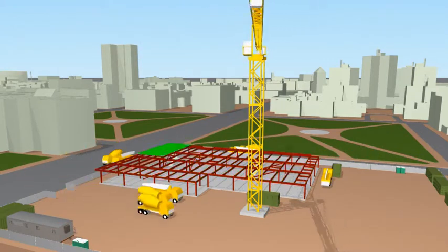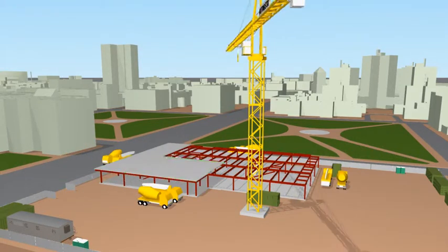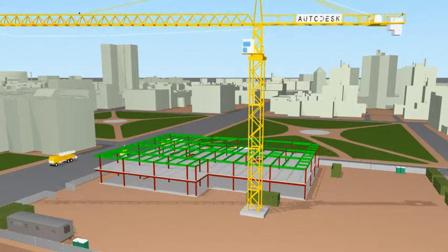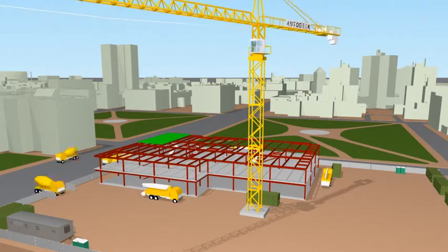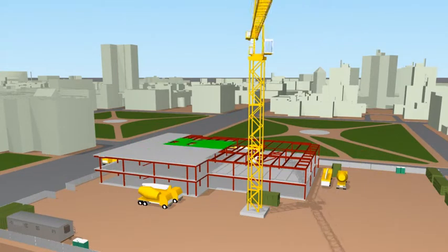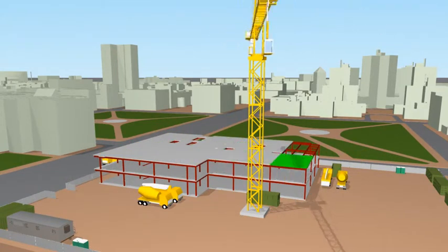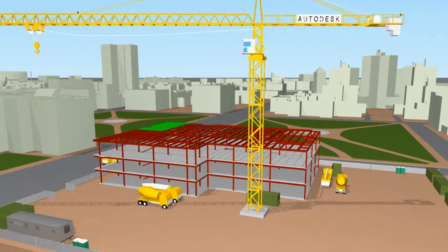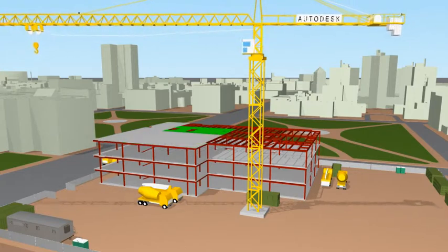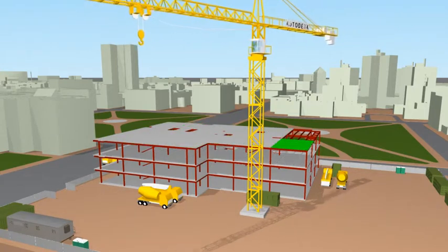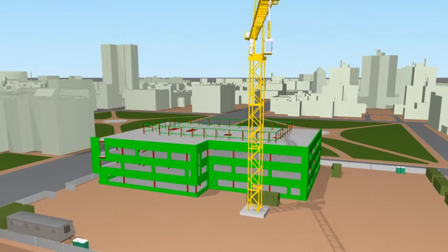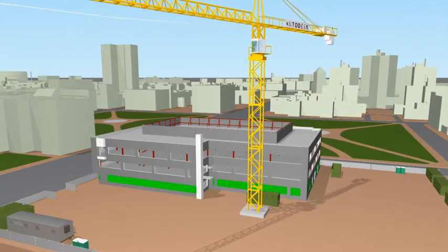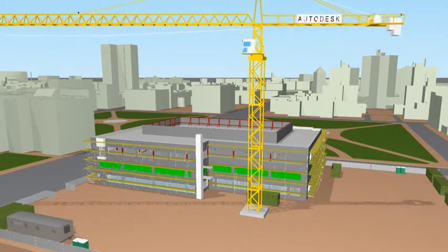Using the schedule to identify when materials will be delivered to site and where they can be staged, for example, whilst maintaining relevant access routes. The simulations can also be used to communicate temporary road closures, diversions and so on, in order to gain local government approvals or public acceptance. Or to ensure adequate access to install specialist equipment, or to explore removal of equipment for maintenance purposes.